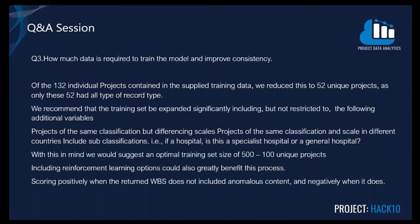Question three: we used 132 individual projects contained in the supplied training data, with 52 unique projects as these only had all record types. We recommend using an optimal training size of 500 to 1,000 unique projects to significantly improve the efficiency of the GPT-3 model.